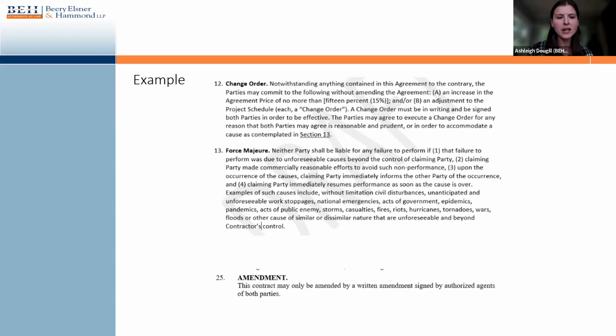The change order language is a little bit more involved. It says that you can commit to the following without actually following that amendment process. Here, it permits a contract price increase of no more than 15%. That's considered a minor price adjustment in this case, or adjustments to the project schedule. Each of those may be executed via a change order.